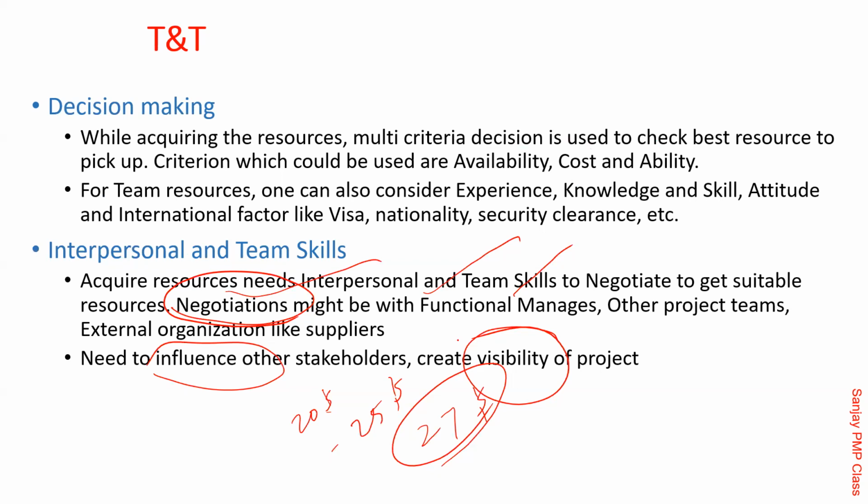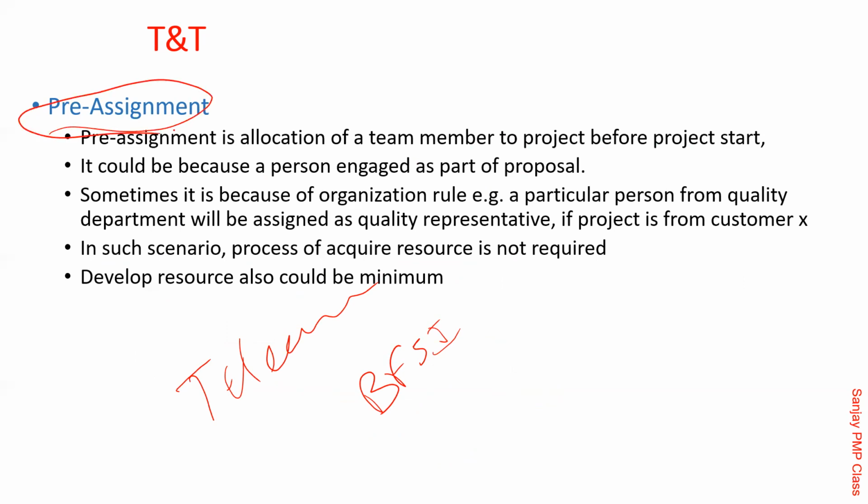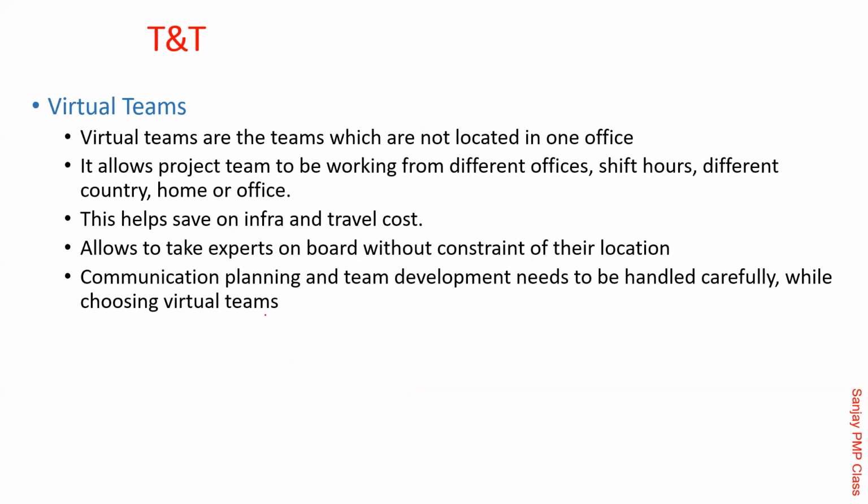Yeah. So then pre-assignment. Sometimes people are directly assigned to the project because they are working in pre-sales. Sometimes, in the organization, when a project comes in the telecom domain, a telecom expert will always be associated. Or when there is a BFSI project, there would be a functional guy from financial accounting coming in. These are called pre-assignment. Pre-assignment has the advantage that developing resources, which is giving the training, becomes easier because that is already done as part of that.